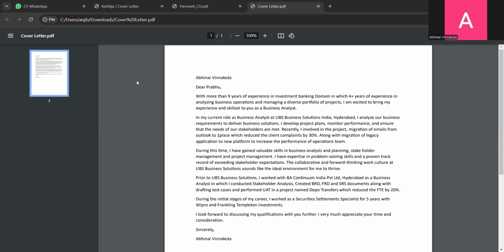for the sprints we take, right? We will take the sprints based on the complexity points, meaning the effort. Normally, for every 2 weeks, each developer should work on 8 complexity points. That's fixed. One should not take more, one should not take less, right? 8 points they should complete. So based on that, some user story might take 1 point, some user story might take two, some one.